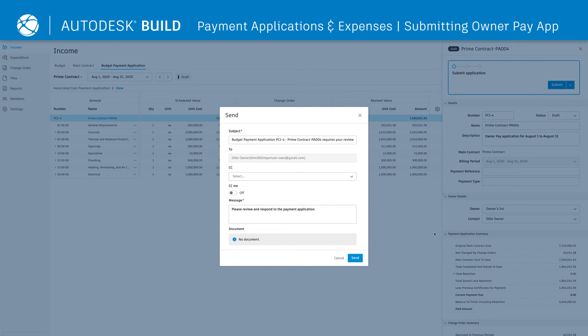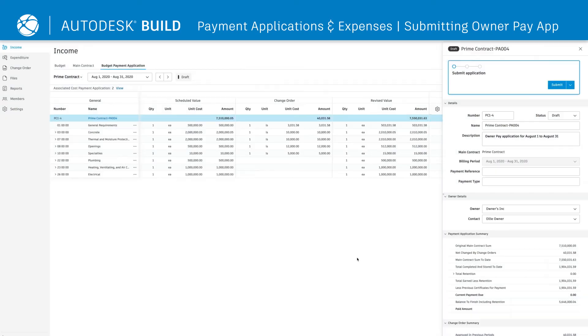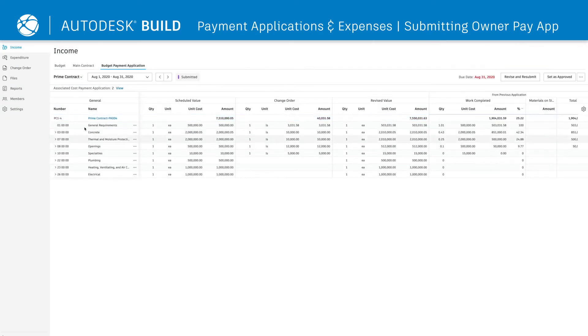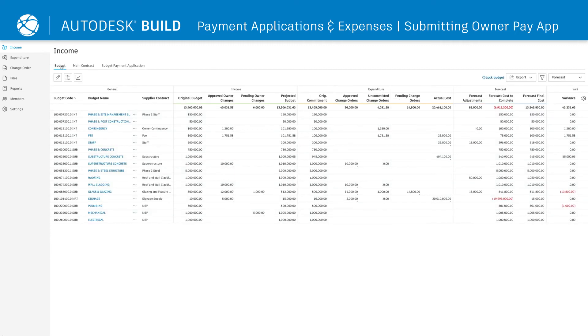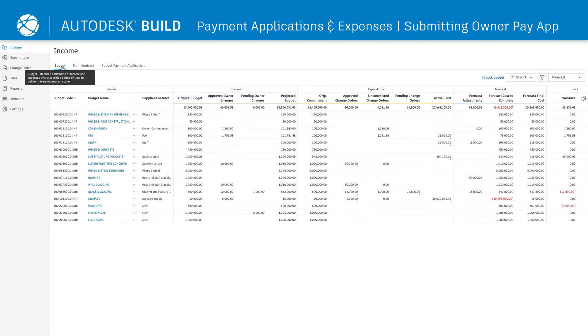Owners will be notified of the payment application and have the option to log on and approve it directly in order to expedite the process. All approved payment applications and expense information will sync back with the Budget Summary View, providing a real-time view of the overall project health.